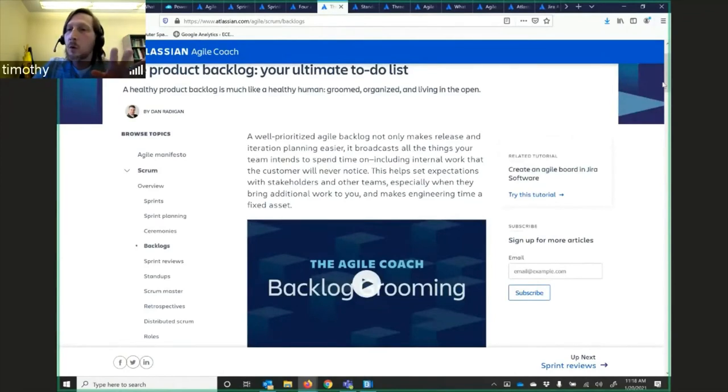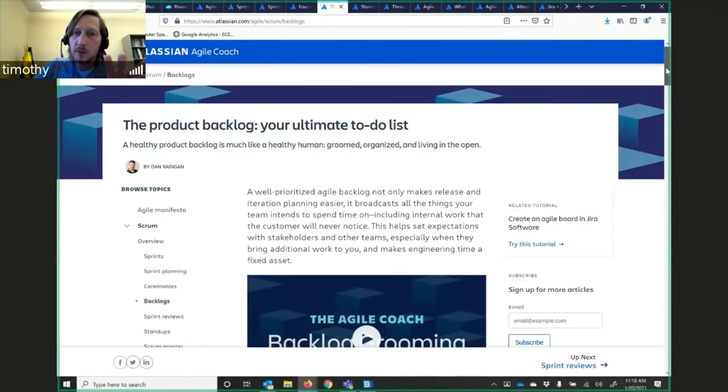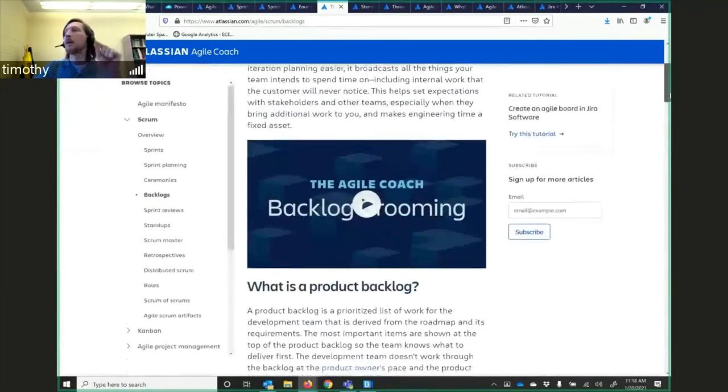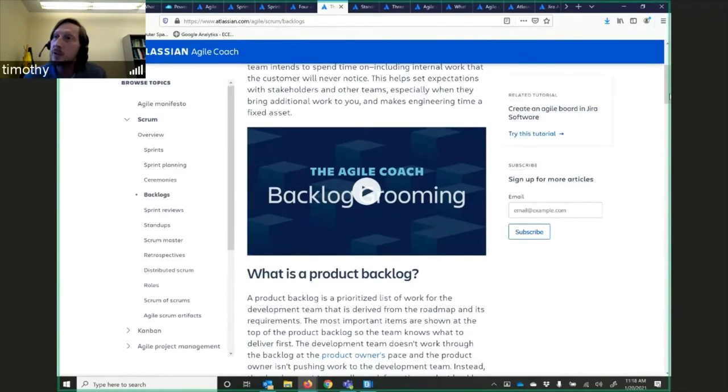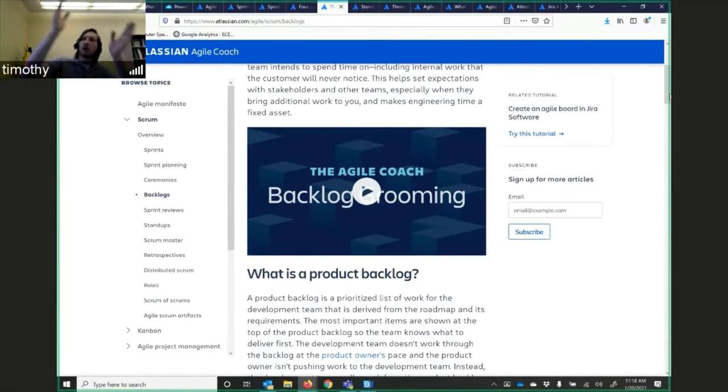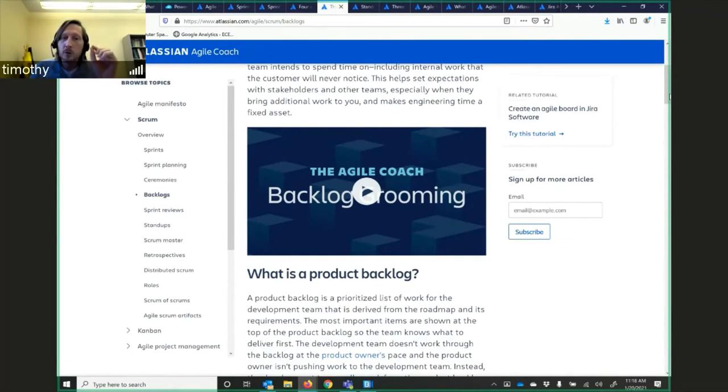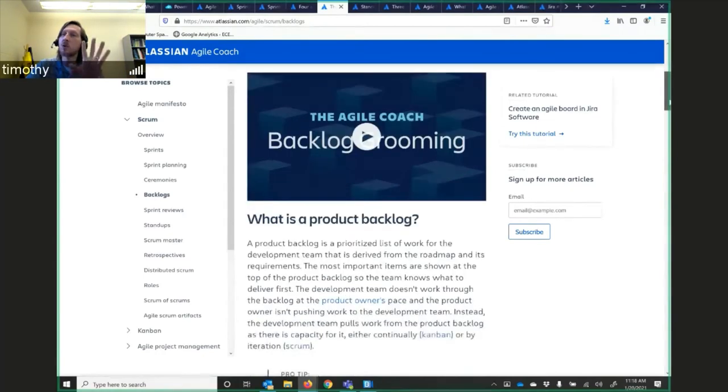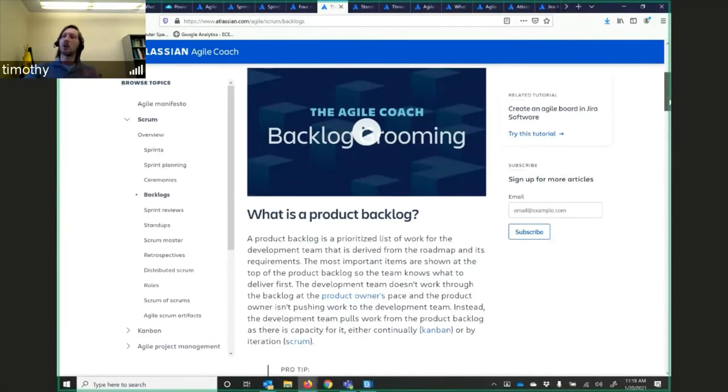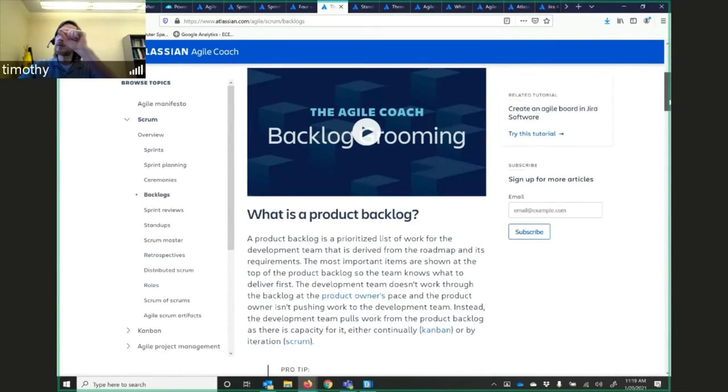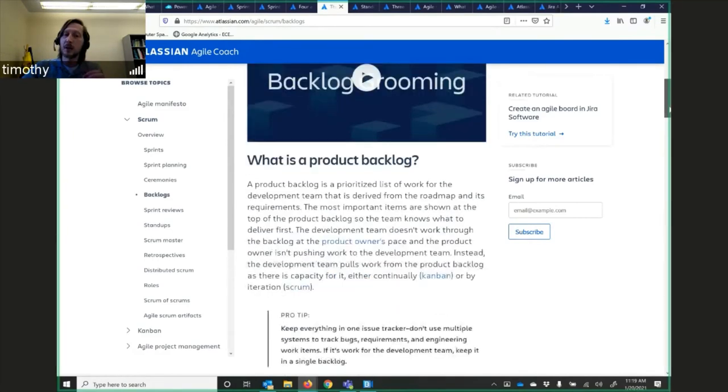One of the cornerstones of the Agile process is the product backlog. This is your to-do list. This is what is so important. One of the things that I've said that we will be grading on at PDR and CDR is your to-do list, your backlog. You need to know what is done, what is yet to be done, what is next that you're going to do. If you don't have a plan for getting from where you are to the end, you're not going to make it there. This product backlog is extremely important in actually putting down on paper what you've got to do in order to get from here to there. So everybody's on the same page, and everybody can move in that same direction. You can talk about it, and the team can say we need to develop this thing. But you need to write it down, and you need to write down the steps that you need to accomplish to get there. That makes sure there's effective team communication.